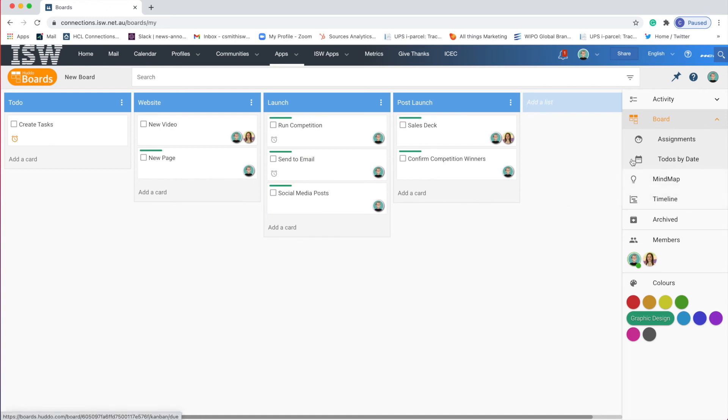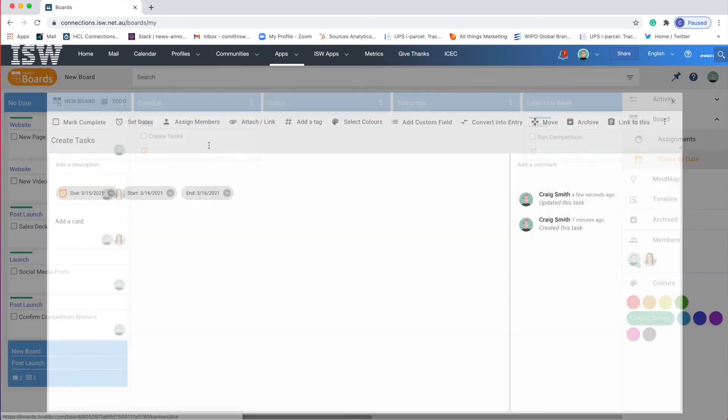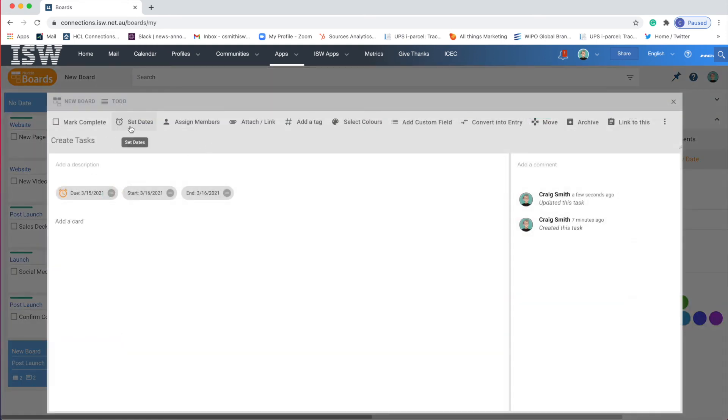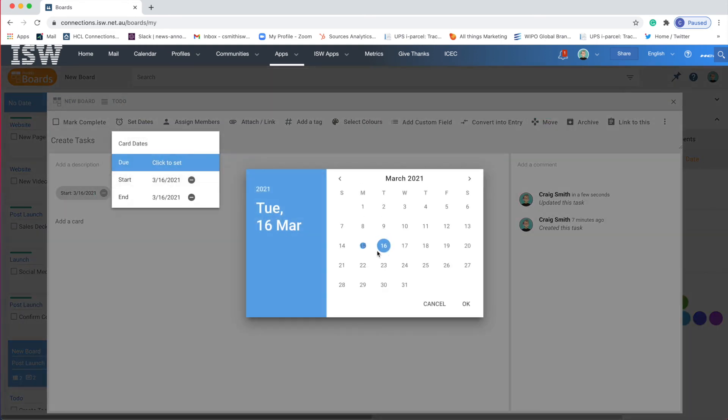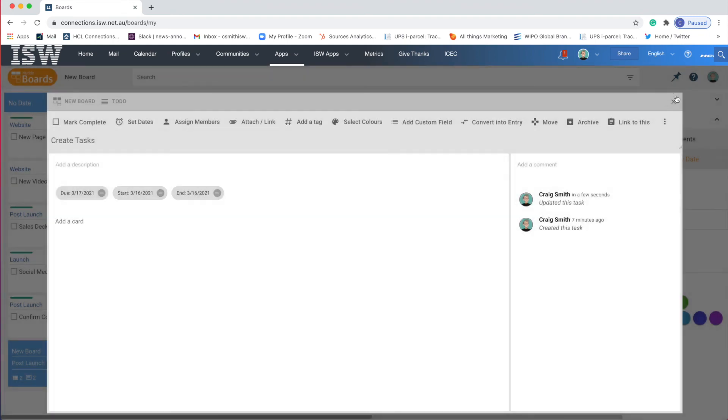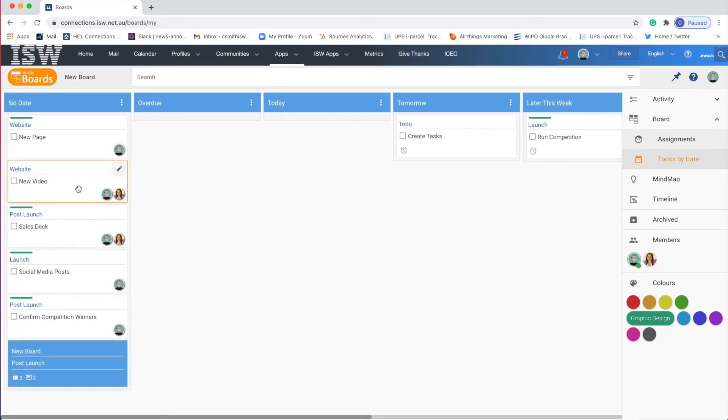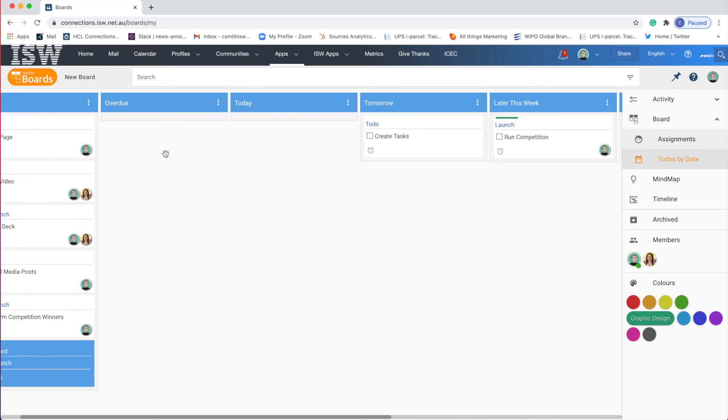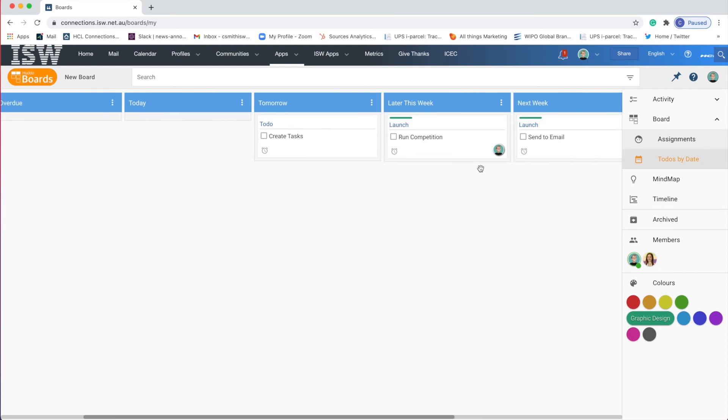So if we look at to-do date view you'll see that I have one task overdue. So I can actually say okay that was a bit maybe unrealistic. Let's add a due date of tomorrow. And that has now moved that card to a different date. And you can also see there are some here without dates. So that's quite important for you to quickly see what hasn't been captured as having a due date and then you can add it. And you can see which ones are due when.